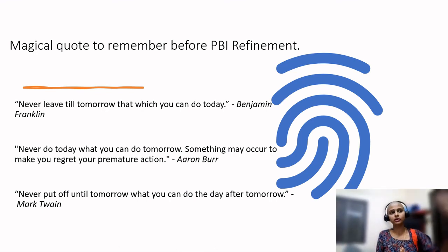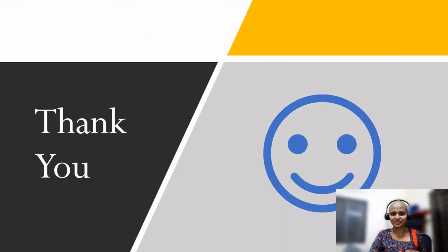You just want the next two sprints of product backlog refinement items ready, have that alone ready. Don't do too much, and in the meantime don't have too few PBIs refined either. So this is how we have to do our product backlog refinement.